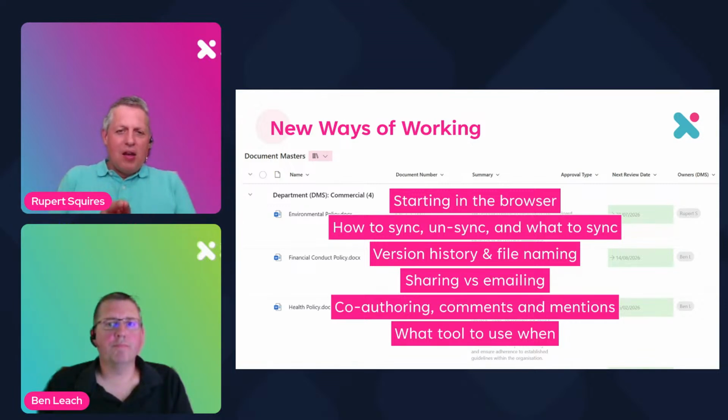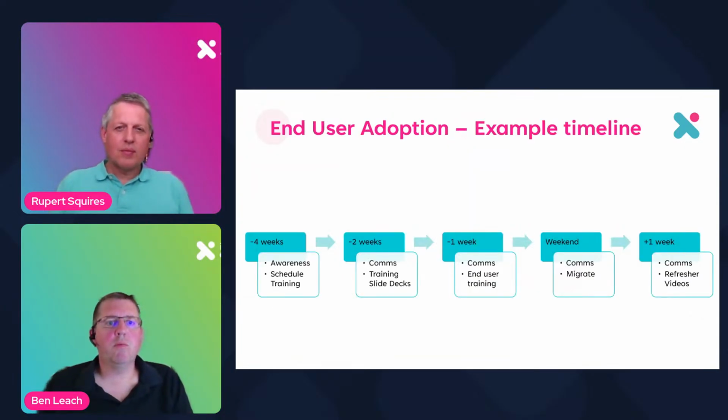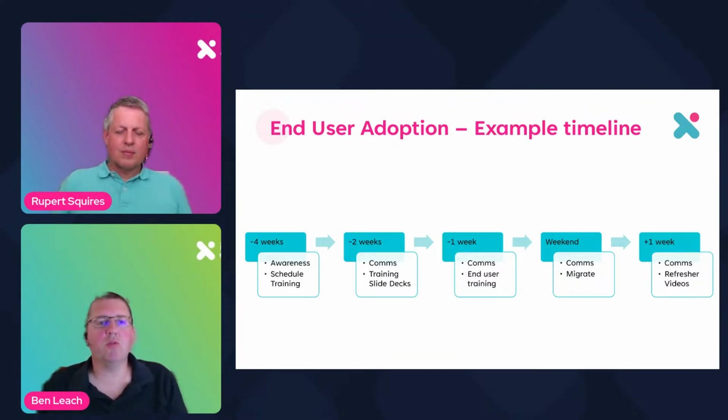And Ben, when we're planning a launch of SharePoint for document management, what are some of the steps that we're thinking about, if I took it week by week? Yeah, we put an example timeline here, and ultimately what we're thinking about is, in most cases, you're gearing up to a migration from your file shares. So you need to be thinking about that migration weekend itself and planning backwards from it.